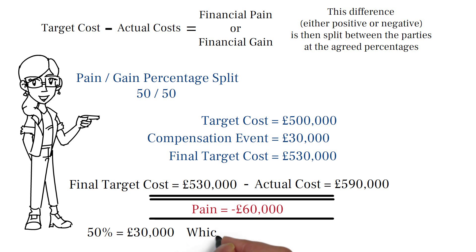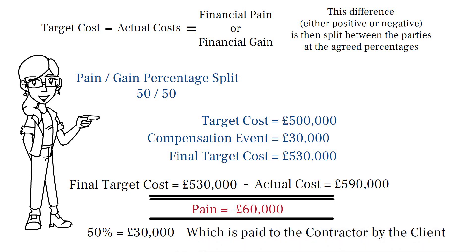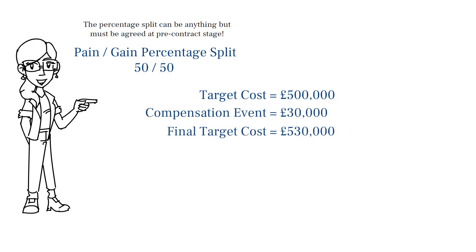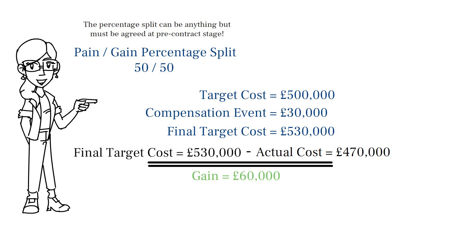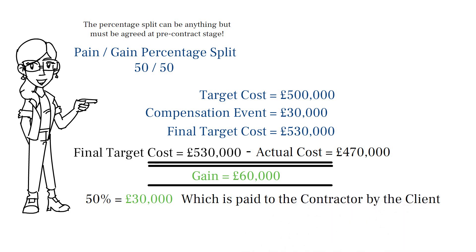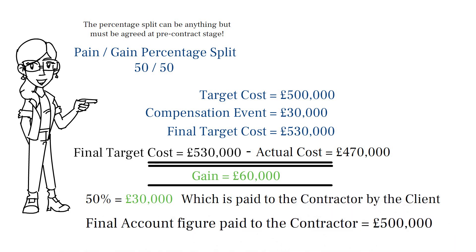So, in this scenario, the client would pay the contractor an additional £30,000, which is half of their additional costs over and above the target price. Now let us just imagine that rather than the project being £60,000 over the target cost, it came in £60,000 under with a final figure of £470,000. In this scenario, the client would pay £30,000 additional to the contractor, so their final payments would amount to £500,000, despite their costs only being £470,000.